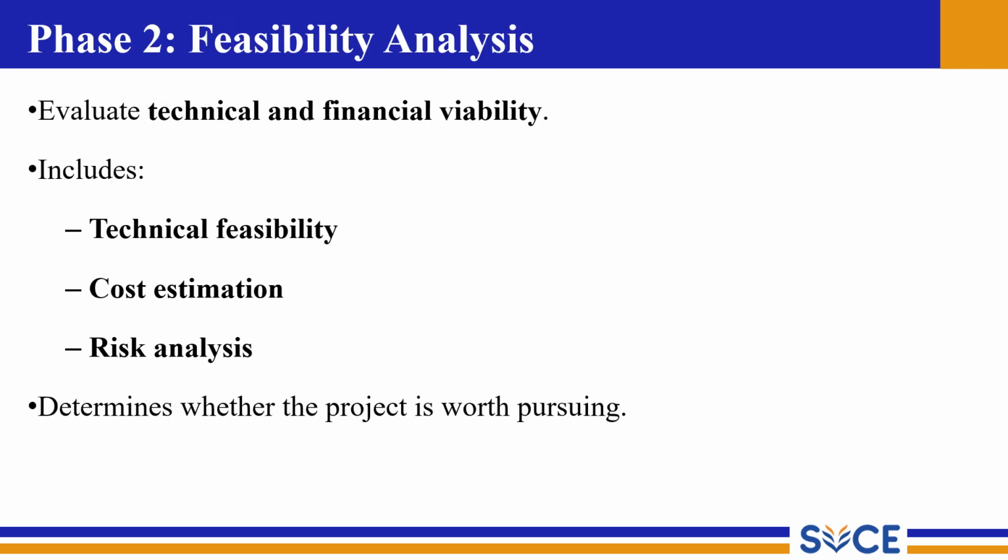Once we have a plan, we must check if the project is feasible technically and financially. This phase answers the question, can we really build this? Feasibility analysis includes technical feasibility, cost estimation, and risk analysis. In technical feasibility, we ask: do we have the right tools, technology, and expertise?